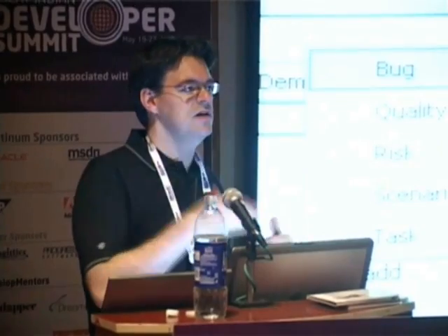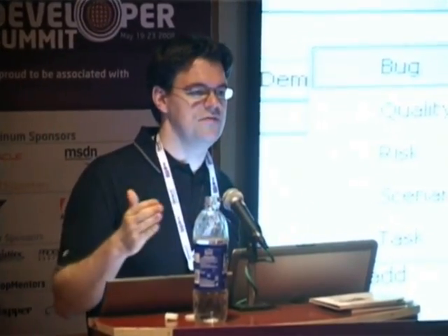So as you take a look historically across all of these different features and a nut assessment of the feature, you'll be able to say that a 1 nut takes approximately from 3 to 7 days to complete. So therefore, when you do your estimation, the more data you collect on your own team in terms of nut value, the more accurate your assessment will be.